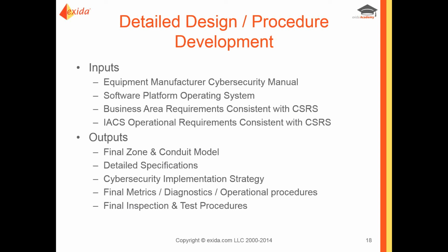After the conceptual design is complete, at the end of the conceptual design and the SIL verification, you should have your equipment manufacturer cybersecurity manuals, the software platform operating system. The business area requirements need to be consistent with the cybersecurity requirement specification, and the control system operational requirements need to be consistent with the cybersecurity requirement specification. Those two sub-bullets illustrate the importance of integrating this work process.